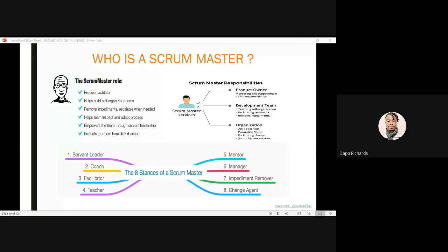Another thing is that I think Gabriel mentioned the backlog does not need to have been completed. So as a developer, if I have something I need to work on, it's not clear, I move it downward. I focus on the ones that I understand very well and the ones I can pick on. The product owner needs to go back and ensure that thing is clear, well detailed, and the developer can pick up the work and carry on effectively. But in Scrum, to go back to what I said earlier, there is no BA title. It is the PO, who is the product owner.